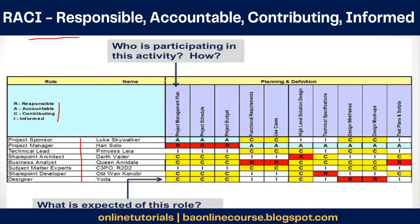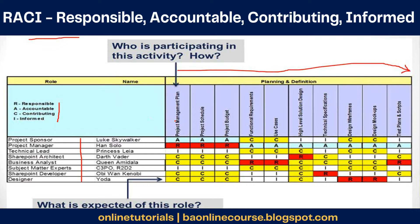On one side you have all the roles, and on the other side of the table you have the detailed activities in the project. For example, taking only the planning and definition part: you will first create the project plan, then the schedule, then the budgets, identify the requirements, and use cases. These are the activities done right from planning till creation of test cases. You list down those activities, then list down all the people in the project, and then map each role to what they would be contributing across each of these activities.